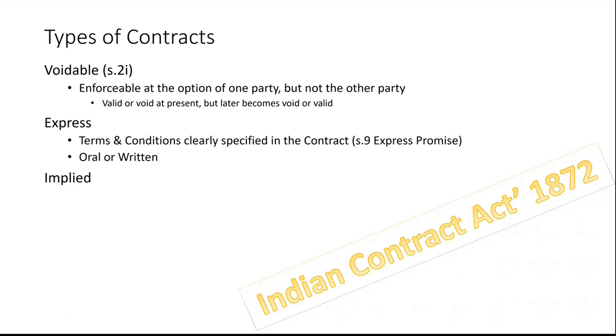Okay. But here the word construction is used expressly, or as a contractual word, because construction generally means to build, not to design. Okay. I told another word as an example when I said a wall: lump sum turnkey. You say it's a lump sum, meaning everything is included. Lump sum, turnkey project. That's my job, nothing else. You have to give everything as a lump sum price.